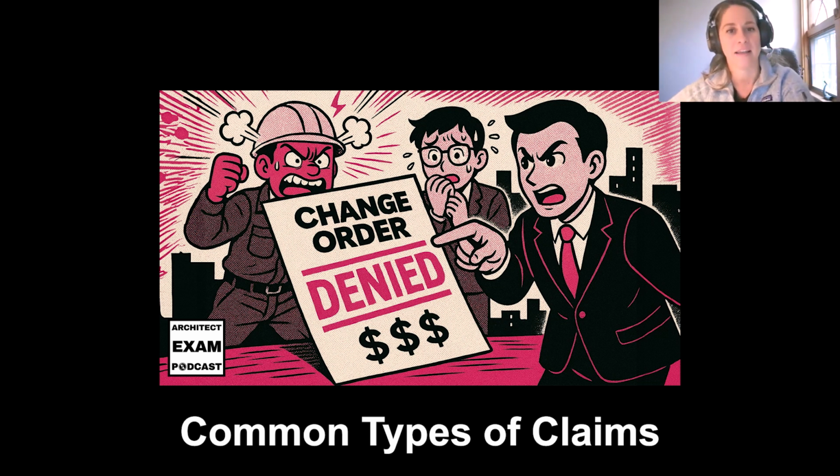There are a lot of timeline impacts to consider as well. There are different resolution methods when there's a dispute happening on a project. So keep in mind that negotiation, which is maybe the first step, typically can take 1 month, maybe 2, maybe 3, a 1 to 3 month timeline. There is also mediation, which might need to happen if the initial negotiation process doesn't go well. Mediation can take anywhere from 3 to 6 months, right? That can take a while. And so you're already stacking up this time against your project schedule.